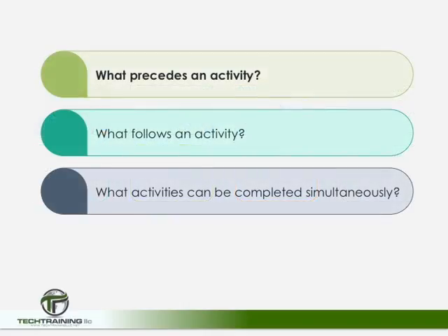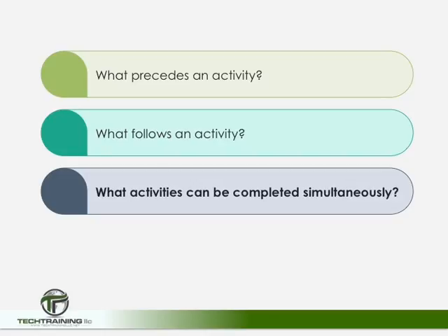But again, the schedule should be created as a management tool in the field. To do this, we must be clear about the activities. More specifically, which activities follow a particular activity and which activity can precede a particular activity. And just as important, which activities can be done at the same time as other activities.